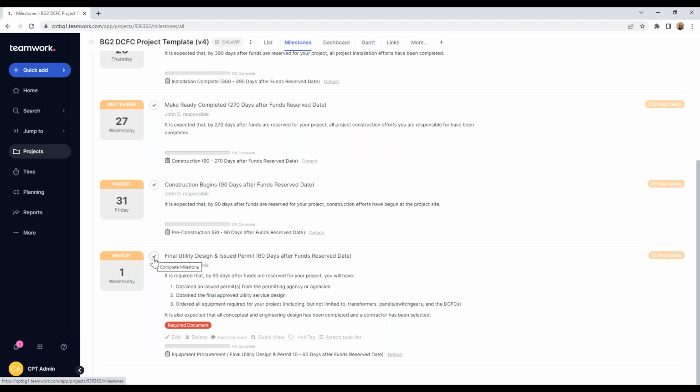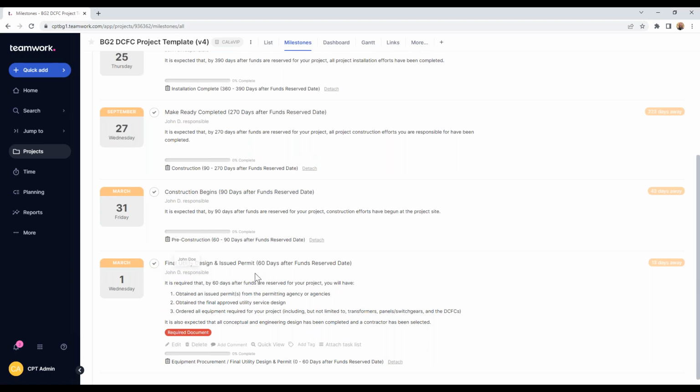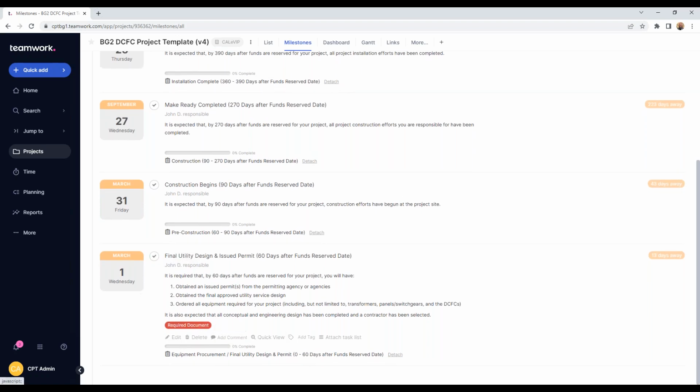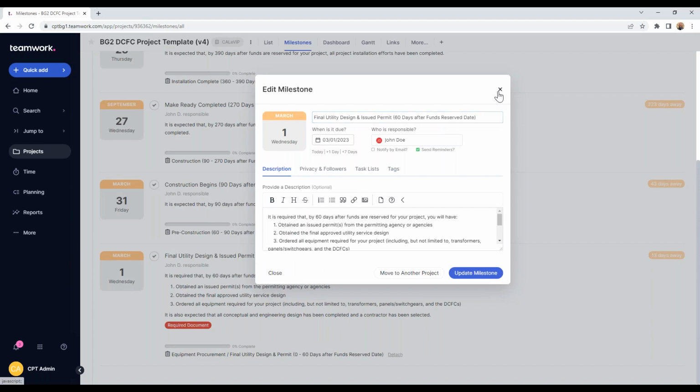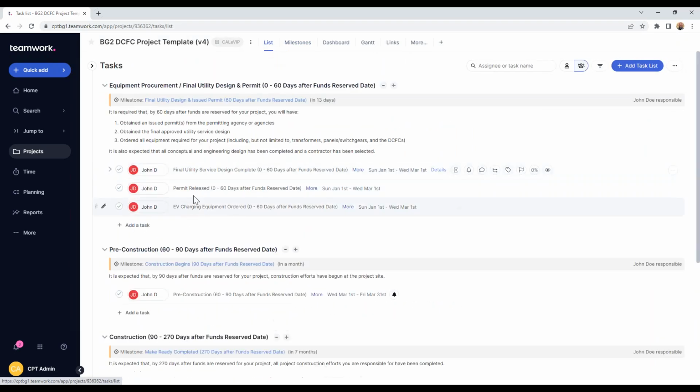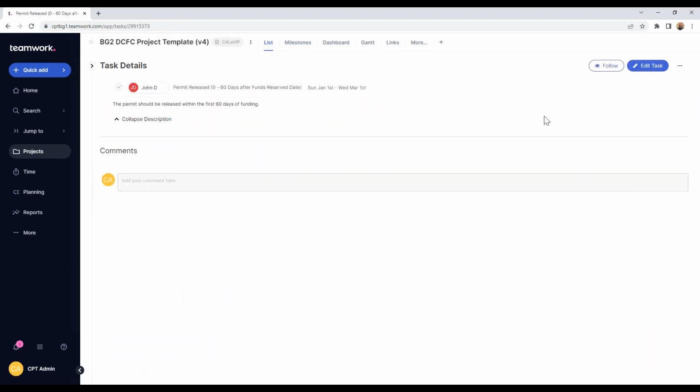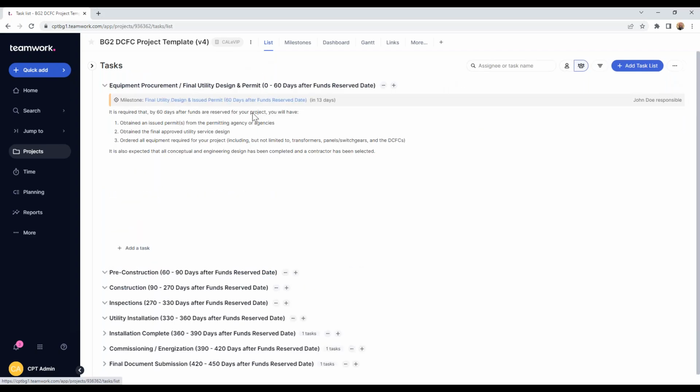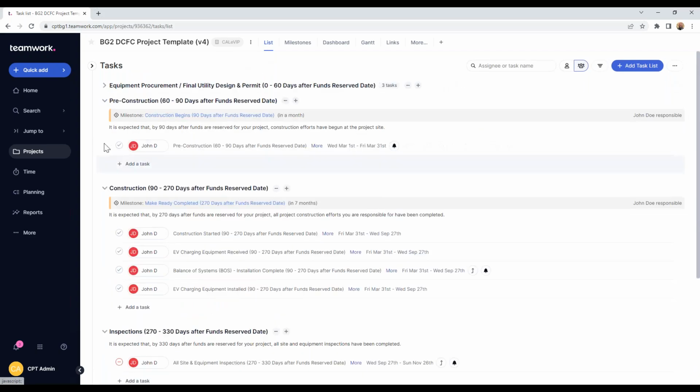If it's done, you can just hover over this check mark, say that is done. If you want to make a comment, you can edit and make a comment. Additionally, with tasks at least, you can edit the percentage complete by clicking into it and modifying the progress. Milestones you can't modify the percentage. That is not required. It is required to click it done when it's done, but you can use the percentage complete if that is useful to you.